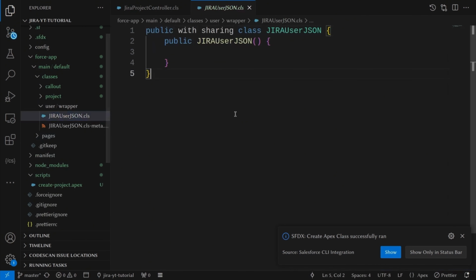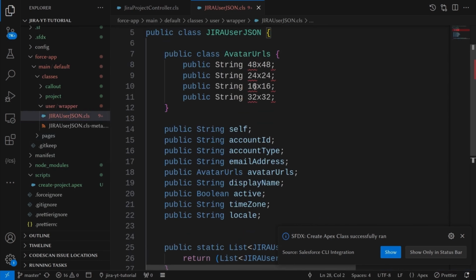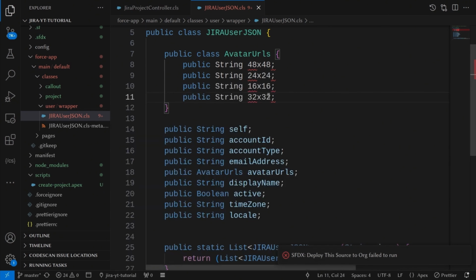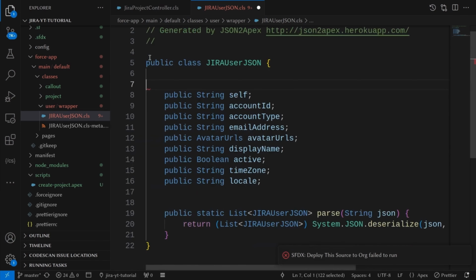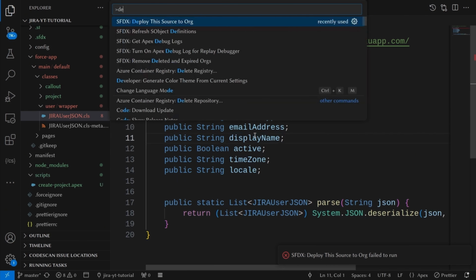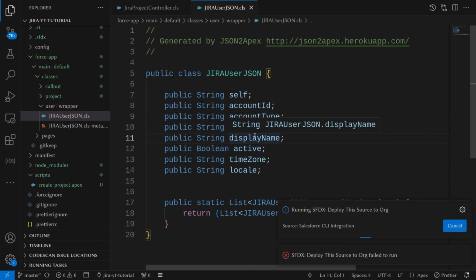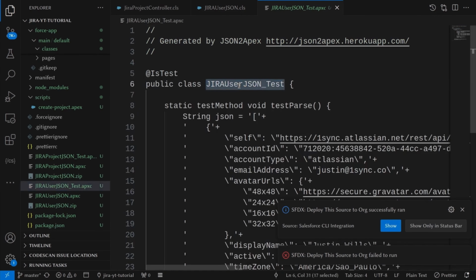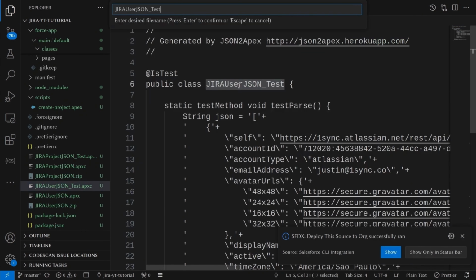But it's the most expensive option, and the real costs typically land 30 to 50% above the initial estimate. It needs a small team sustained over 4 to 6 months: a Salesforce developer, someone owning architecture calls like event queuing and conflict resolution, a QA engineer, and a Jira administrator. And the build doesn't stop at launch. Three Salesforce releases and Jira's own release cycle each year mean real ongoing maintenance indefinitely.